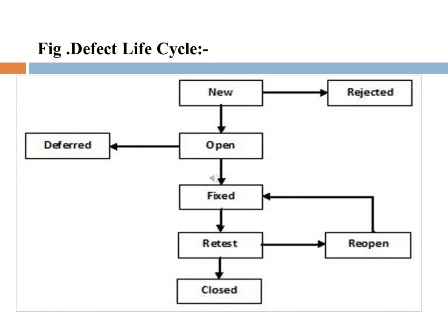Then review. The generic life cycle has two additional states and extra connecting lines. The review state is where the project managers or the committee, sometimes called a change control board (CCB), decide whether the bug should be fixed. In some projects, all bugs go through the review state before they are assigned to a programmer for fixing. In other projects, this may not occur until near the end of the project or not at all.